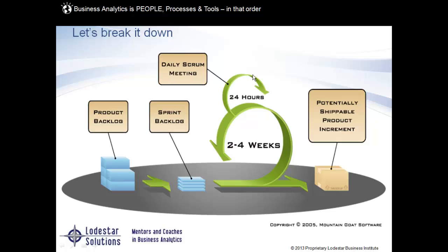We meet on a daily basis. We meet to say, what did you do yesterday? What are you going to work on today? And what's going to stop you from getting that done? Every single day. It should not exceed 15 minutes. Anybody is welcome, but only the project team can speak. So if you want to invite the key stakeholders, you want to invite executives, they can listen, but it is not a time for questions.